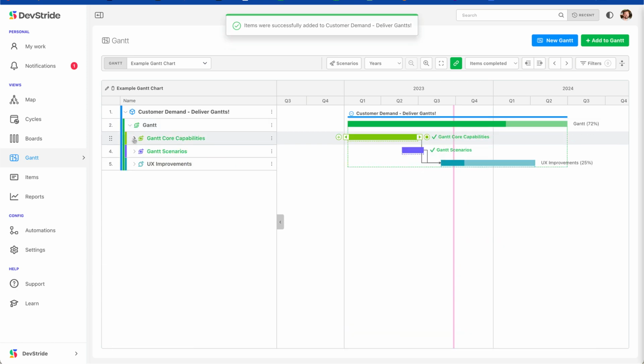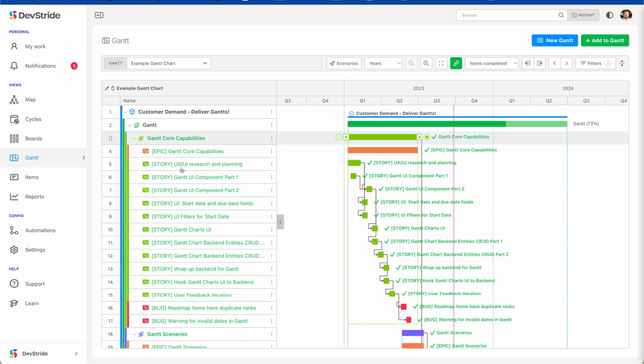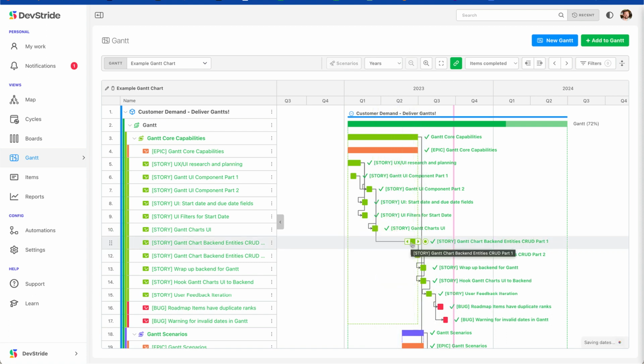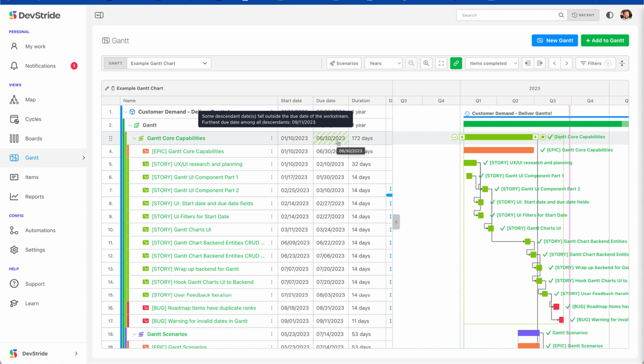Those portfolio level Gantts are incredibly powerful because they tie together work across multiple products, multiple teams, multiple value streams, such that you can see dependencies all over your organization, and you can see how a delay in any one portion or one program or one team will impact delivery in another team, and ultimately how those delivery delays will impact a key milestone that is immovable.